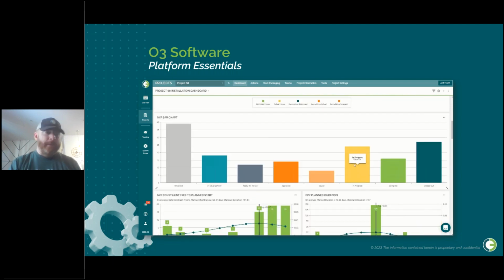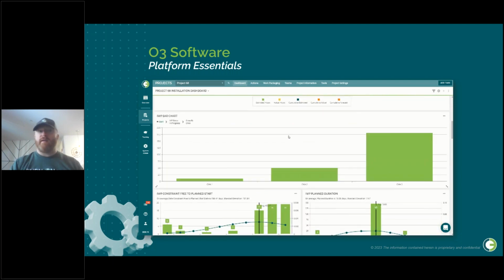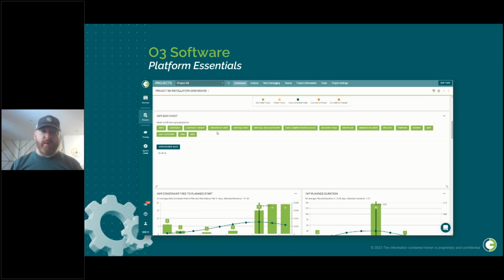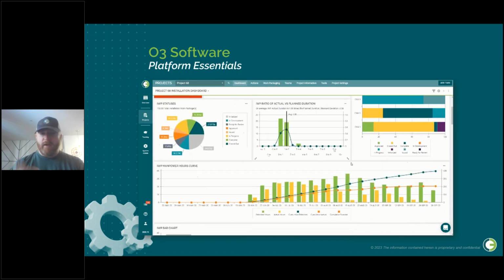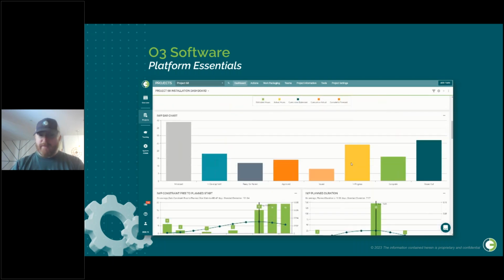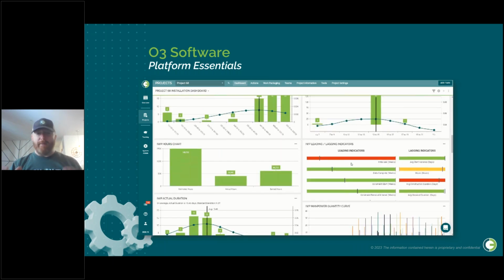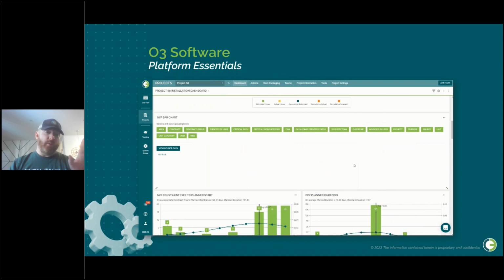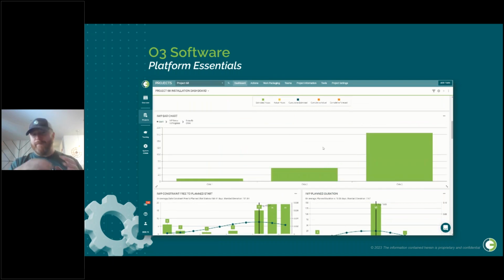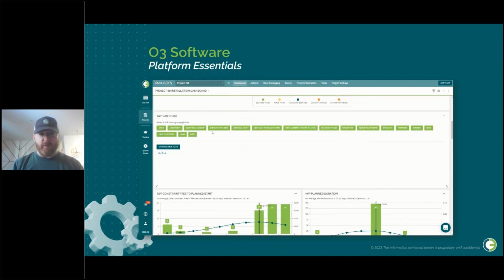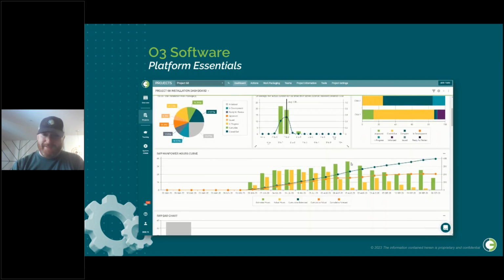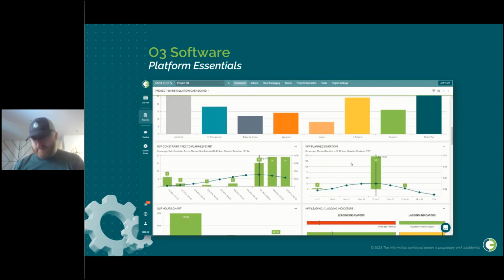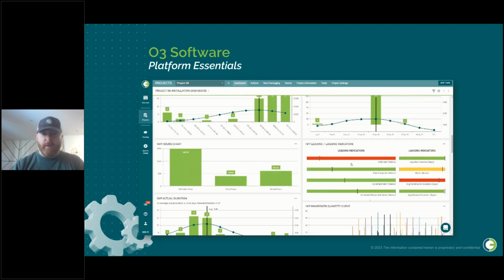If you say, we will use this to improve our safety performance or our installation rate for pipe and steel, you need a method to be able to track that. And O3 software will give you these very detailed dashboards, and you can have metrics that show, here's where we were before, here's our performance on this job, here's the improvement over time, etc. So that kind of dashboarding information, that level of reporting in detail will help justify after the fact your value in using AWP.